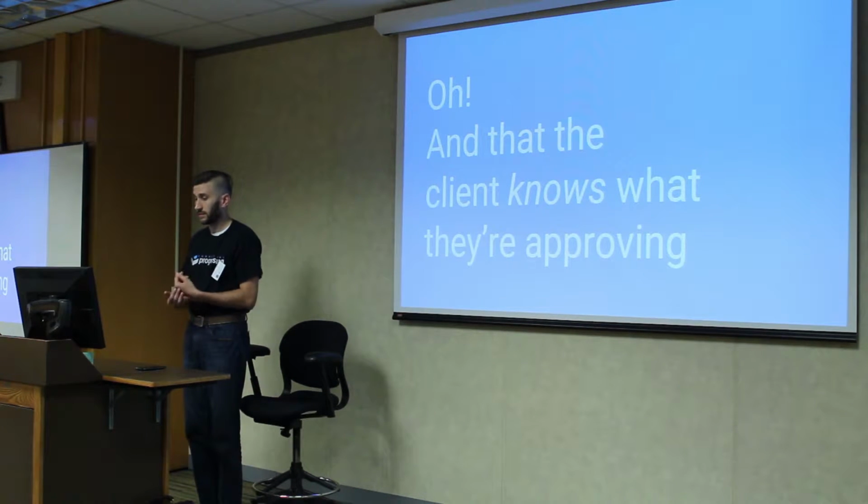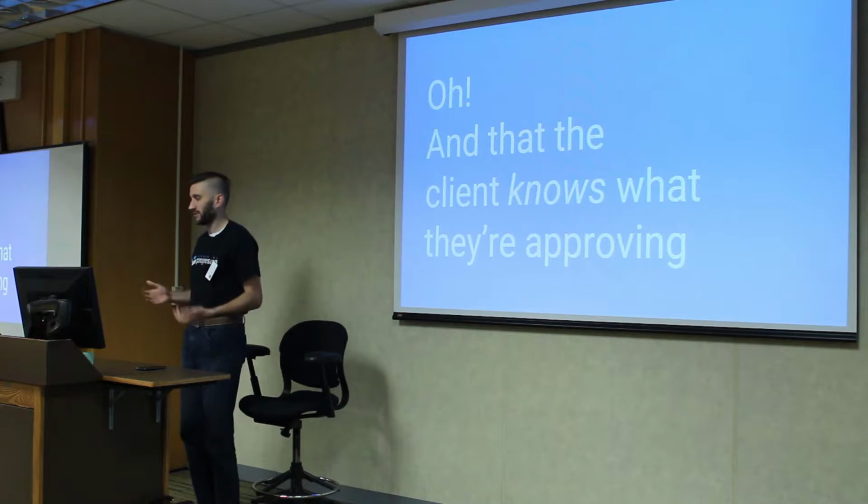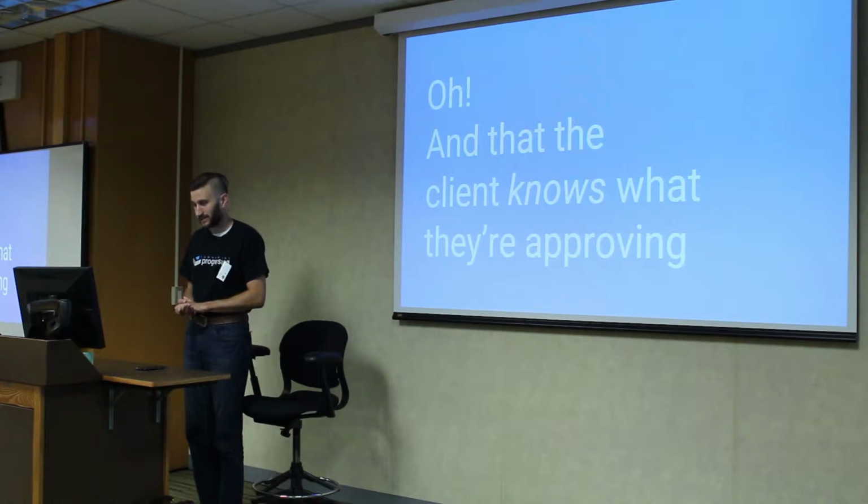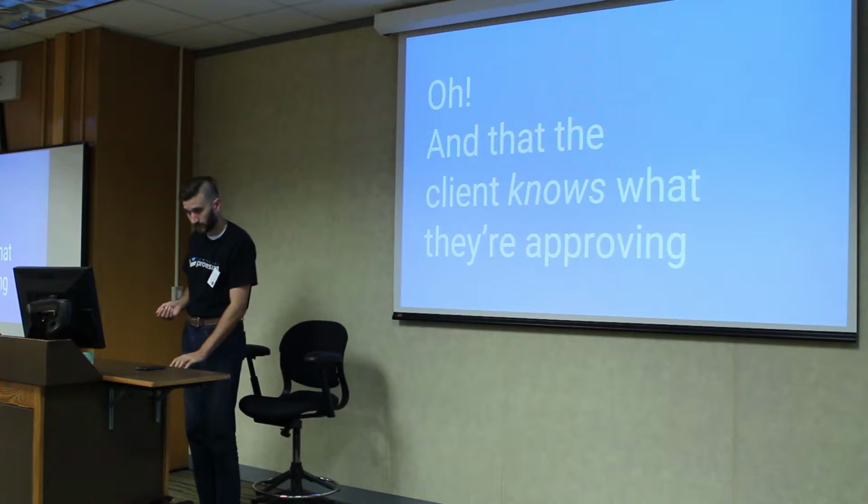And so some of the bigger failures when it comes to having a thorough discovery and then having an end product that meets the criteria of the discovery was, well, that's not really what the client wanted in the first place. So nailing all that down and getting a hard approval is key to a solid discovery process.